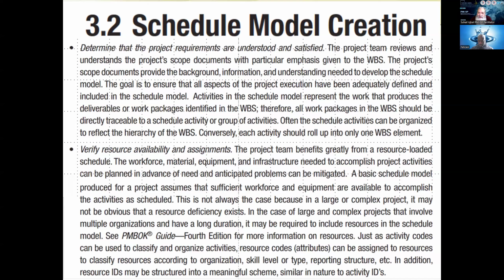Often, the schedule activities can be organized to reflect the hierarchy of the work breakdown structure. Like, we created the work breakdown structure. You can further add activities in the same work breakdown structure, but that is generally not very necessary, because basically the work breakdown structure is broken down to the work package level. But for your convenience, if you want, you can put those activities under those work packages just in the form the WBS was formed. That may be for better understanding.